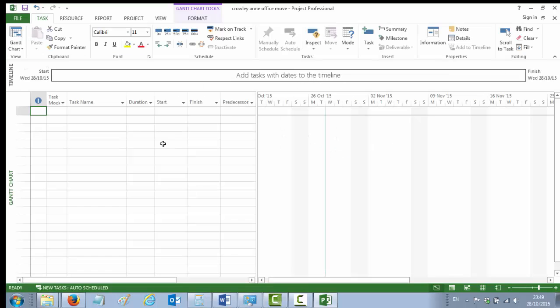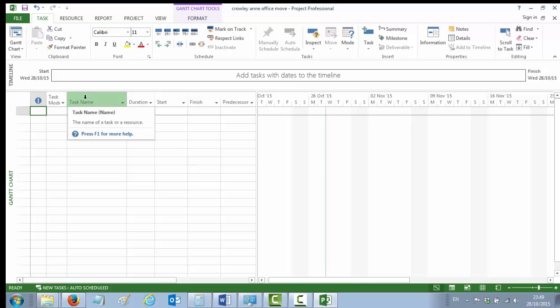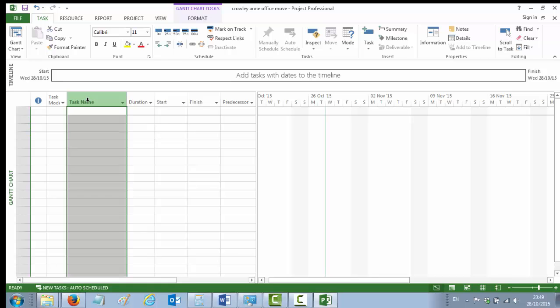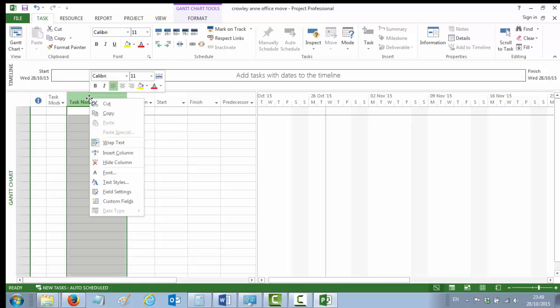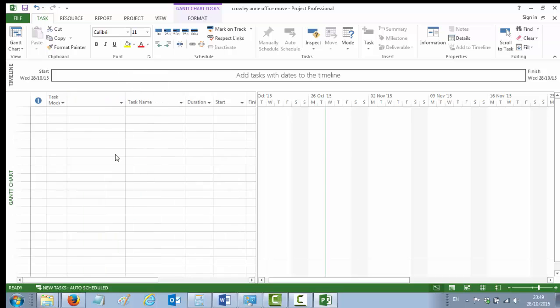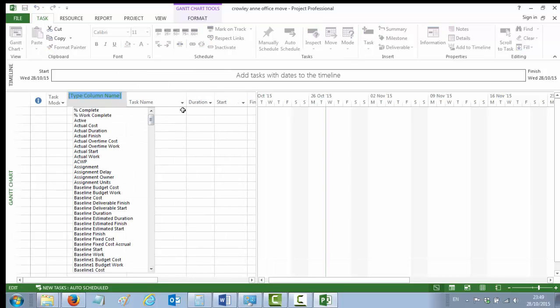So the last of the four items that I'll cover in this video is item number four, where you're asked to add a WBS column to your sheet. So the most common place to put your WBS column is to the left of your Task Name column. So you highlight your Task Name column by putting your mouse just over the column title, and you'll then get the column highlighted. And if you right-click, about halfway down the pop-up menu that appears, there will be Insert Column. So you choose Insert Column, and this inserts a column to the left of where you are. It'll always insert to the left of the column that you've highlighted.